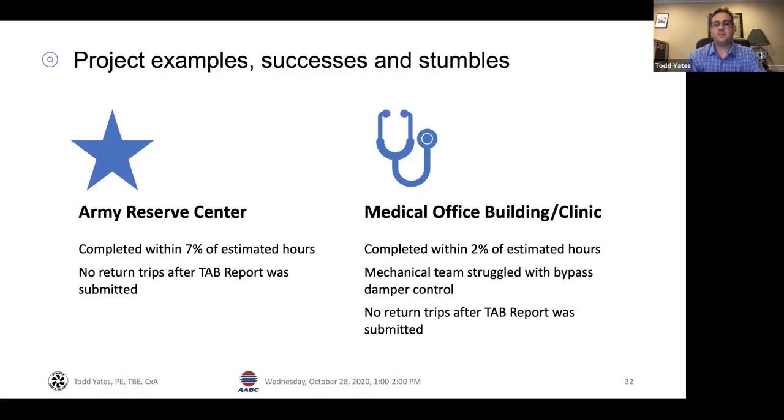It would have been much more difficult had we not had a commissioning provider there coordinating with us, integrating those damper failures that we noted in their FPTs. It's very easy for someone to push that problem off on test and balance and say it's a test and balance issue, bring them back again. That didn't happen. That got worked out through the commissioning process.